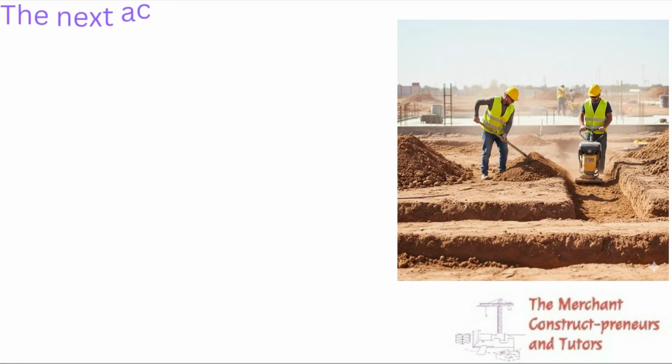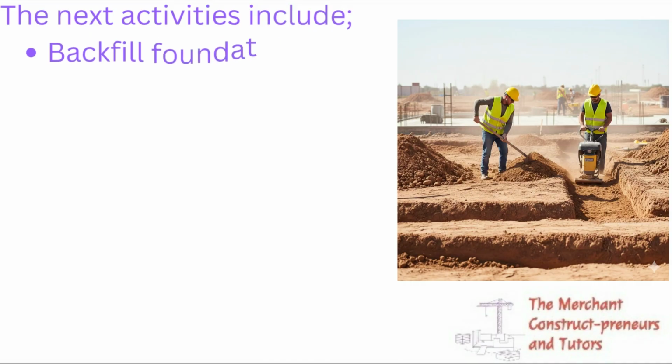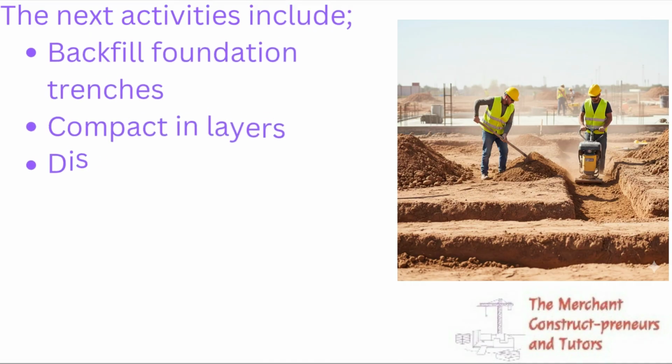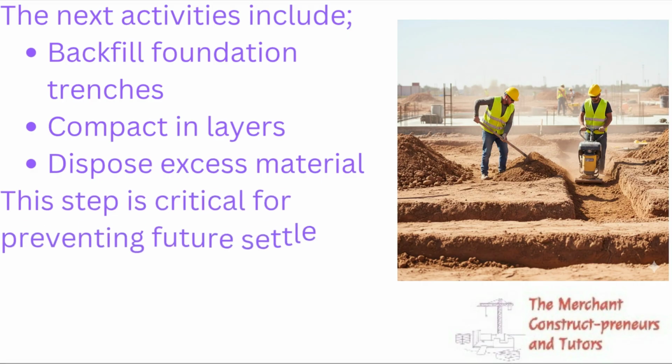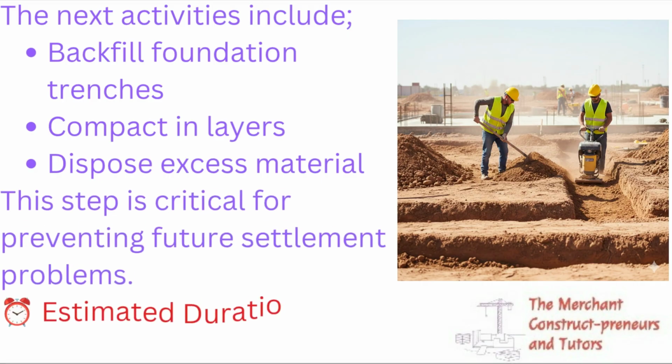From the previous image, you have some hollow voids, after the setting out has been done, and those points have been filled with columns, beams or blocks. Now you need to backfill those portions, those voids, and you compact them very well. So the next activities include backfilling foundation trenches, you compact in layers, you dispose excess materials. Right, this step is crucial for preventing future settlement problems, and the expected duration is within 1 to 2 days.